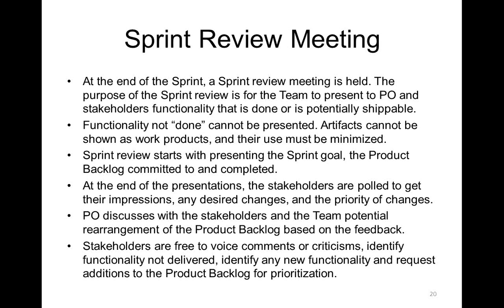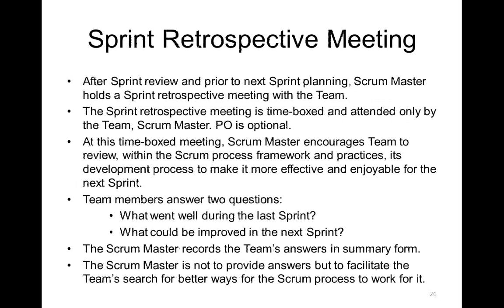Only those stories are demoed which are done. If something is not done, it cannot be presented in the review meeting. All the stakeholders are there. They will generally look at it. They are free to comment here. They are free to give their opinion. And at times it so happens that based on their comments and criteria, looking at the finished story, new requirements or additional requirements will come up which are related to that already delivered thing.